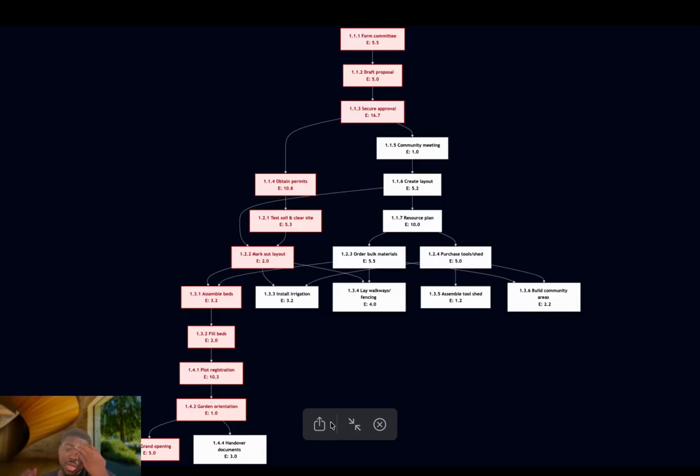Its job is to show logic and dependencies. And so you simply cannot see the critical path or complex relationships this clearly on a Gantt chart. Personally, I find the Gantt chart is more intuitive for tracking day-to-day progress, but the PERT chart was far more valuable for the initial planning and for understanding the project's complex interconnected structure.